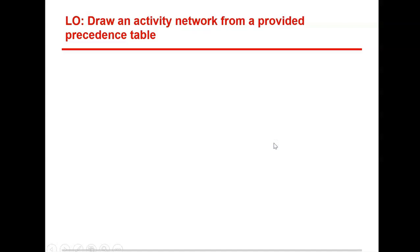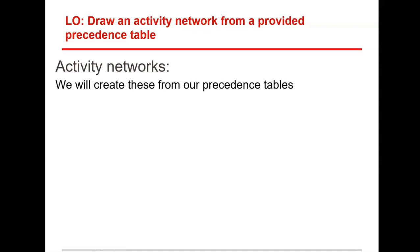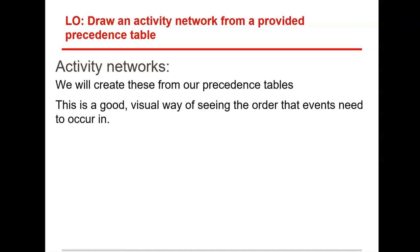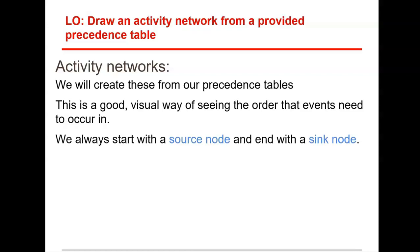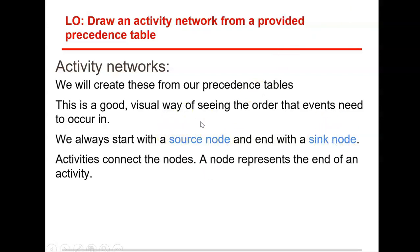Let's get straight into it then. Activity networks — we create these from precedence tables and it's a good way to visualize or see the order that events are meant to occur. We always start with a source node and end with a sink node. Good to memorize what these mean: the sink node is just the last one and the source node is the first one. Activities connect the nodes, and a node represents the end of an activity — the source node doesn't, but every other node does.